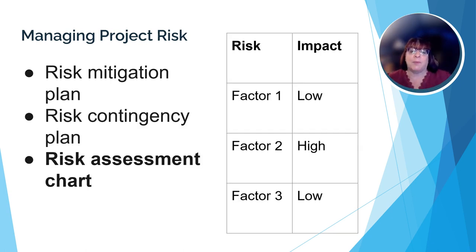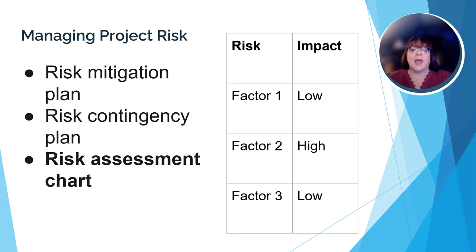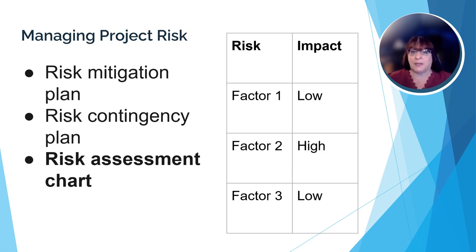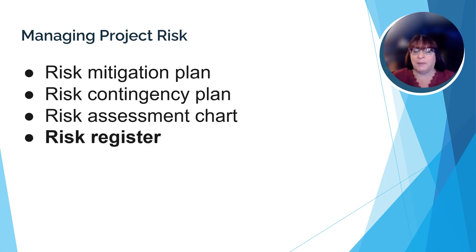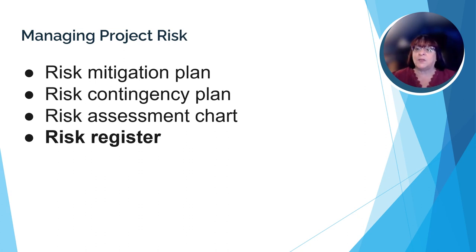The project management team will also develop a risk assessment chart. They gather the risk factors — those things that could happen to impact the scope, budget, or schedule — and determine what their likely impact will be on the project. Those risks designated as high impact will be the ones the team creates contingency plans for and puts mitigation processes in place. If there's still time or money available, they'll do the same for low impact risk factors, concentrating first on those that could lead to project failure. All of this information — mitigation plans, contingency plans, and assessment charts — is saved in a risk register, a one-stop shop for the project management team to track risks, add to the list if necessary, and understand at which point an identified risk is no longer a factor.